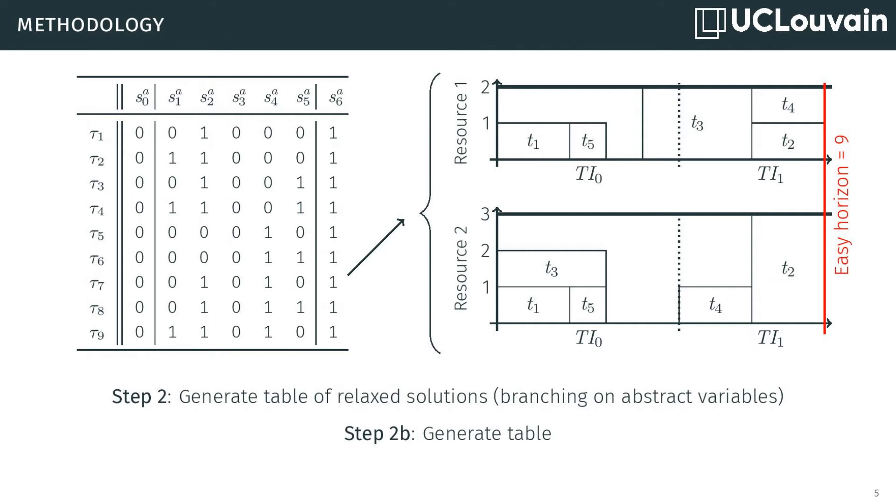The second part is the generation of the relaxed table. This is done by adding the new variables. Channeling constraints are used to link them to the initial start variables. The search space is then explored by branching only on the abstract variables. All the solutions are gathered in the table. Each of these tuples corresponds to a relaxed solution, as the one displayed where the starts of each task have been relaxed.